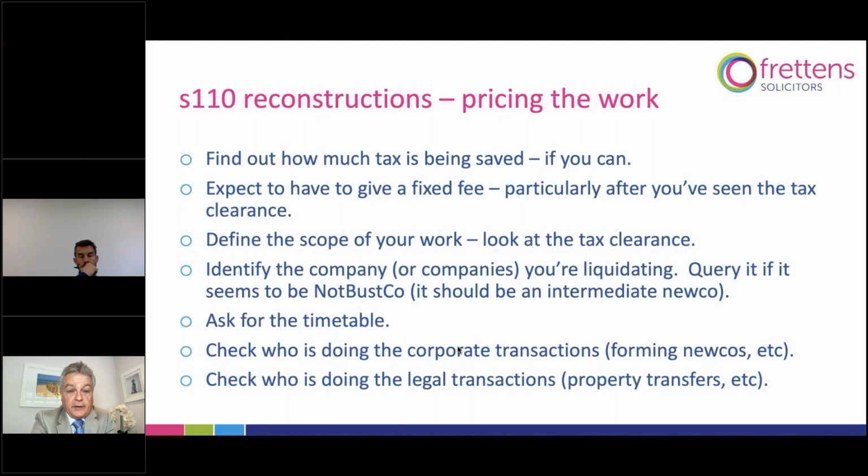You should expect to be asked to give a fixed fee, and particularly once the clearance has been given, that's the point at which you should be able to define the work that's needed reasonably precisely. You should look at defining the scope of your work to make sure that it's clear what you are doing, and very importantly, what you are not doing.